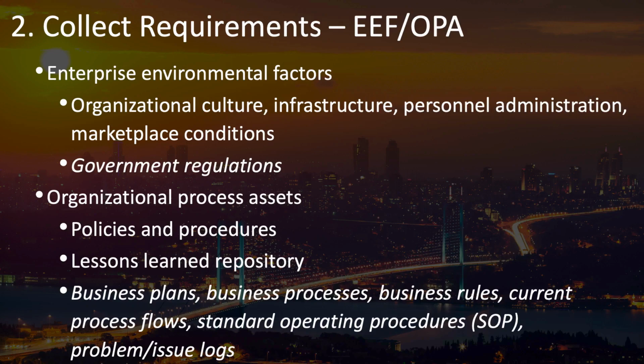In addition, you may have problem or issue logs, especially if you have a help desk that records these sorts of problems and issues and relates them, and these can be a valid, very useful source of information about requirements that are needed for this project.